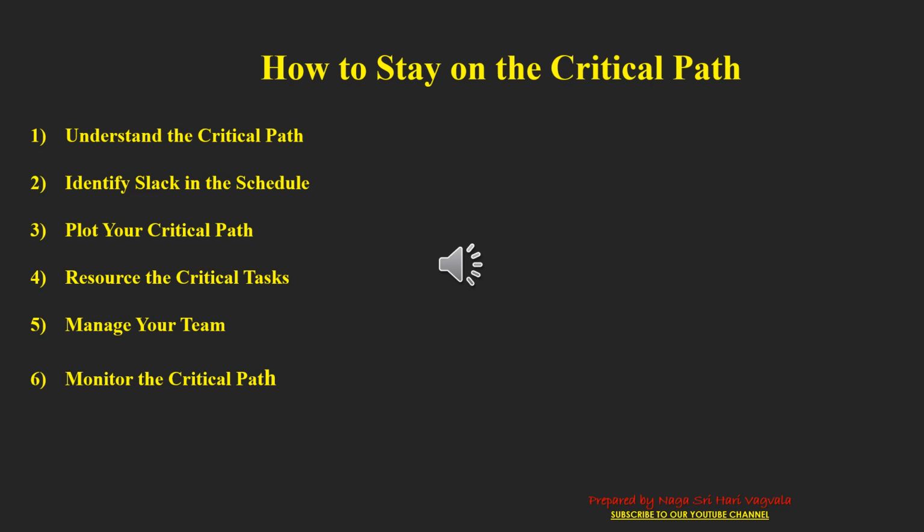The critical path is made up of the tasks that happen one after the other without any slack in the project plan. If one of those activities finishes late by a day, the whole end date of the project moves out by 1 day. Knowing which tasks are on the critical path means that you can monitor them to make sure they all hit their deadlines.